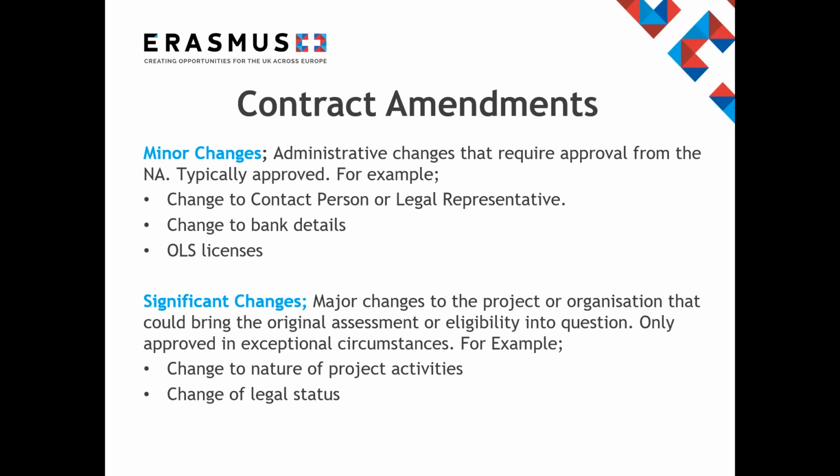We also have the significant changes, and these are the deviations from the delivery of the project as outlined in your application form. As such, they may result in altering the project-specific content of the grant agreement, and they have the potential to call into question the decision of the initial application assessment, or have a significant financial and legal impact.